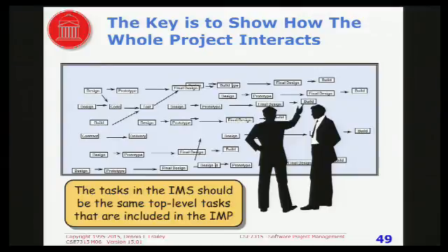And the first thing you do is go over there and say, oh, what's changed since last week? And then every Friday, you would tell the schedule person, here's the changes in the software schedule if you're in charge of the software, or if you're in charge of the electrical design, here's a change in the electrical schedule. And the schedule expert would spend the weekend producing a new schedule and pasting it up on the wall so that on Monday morning everybody saw this big new schedule.